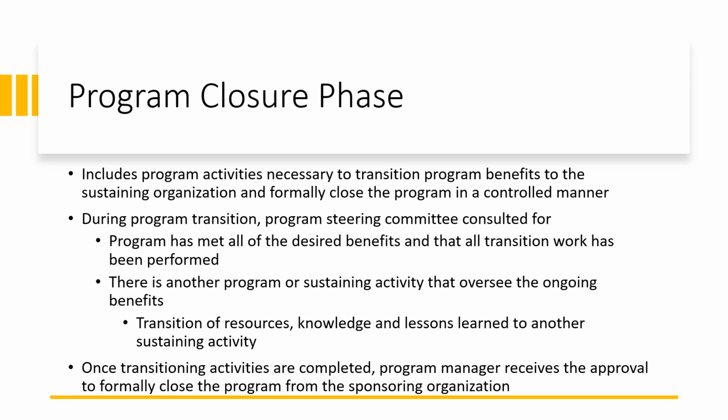In case another program or sustaining activity is going to take over, you need to take care of the transition of resources, knowledge, and lessons learned to that sustaining activity. Once the transition activities are completed, the program manager receives approval from the sponsoring organization to formally close the program. So these are the activities involved in the program closure phase.